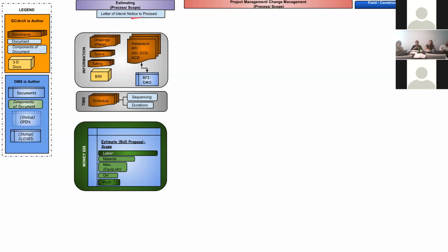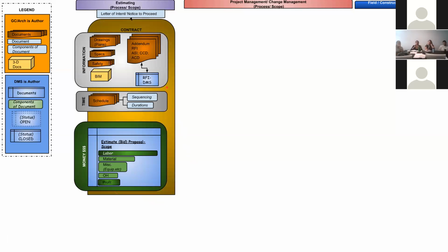The reason they'd issue us a letter of intent and a notice to proceed is that it's the document that gets us initiated, saying you've been selected as our subcontractor. We are just formalizing our contract, getting all the documents and everything in order to send over a contract. So they'll want us to not delay. They'll send us over a letter of intent and notice to proceed. That kind of launches us. And then after that, they will give us a contract.